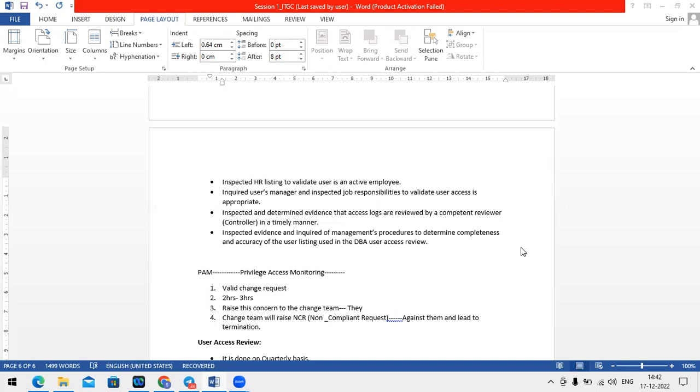The developer will explain the entire story to the implementer: what he has to do and when he has to do it, because a few changes have two or three teams working on them. One would be the database team, one would be the Unix team. So when should the Unix team start their change to implement? When the database team should take action. Whether the first team should be the database team, who would implement something from the database end, or the Unix team, the developer will give a walkthrough before the change needs to be implemented. So that is the reason you need to have an accountability for that.